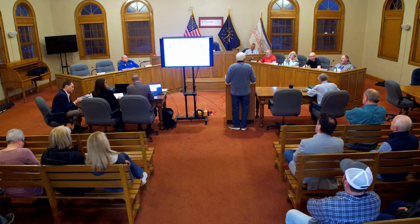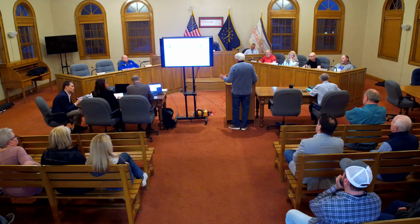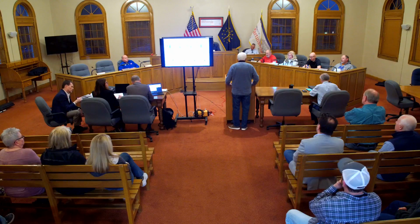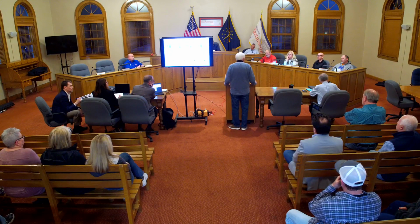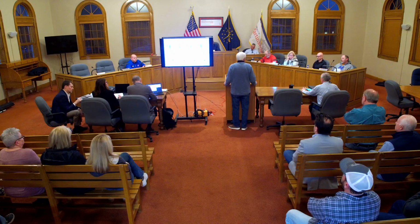front. If you want to know costs, you have to know not just the general scope, you have to have some pretty specific information from an architect as to what you expect in the system, what the expectations are, how it's going to perform, what your energy use is going to be. All these things need to come together. So you'll need to not just, hopefully for Monday, choose which option, but how you'd like to go about it, what you'd like your process to be. I can answer questions on any of those three if you'd like.